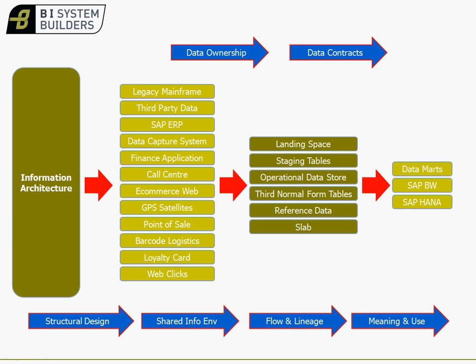There may be a contract in place, so you may need to consider those things. Don't leave things like contractual agreement and how you will access source system data to the last minute, because sometimes these things can take quite a while to get on top of. You'll almost certainly want to be doing data profiling and start that early.